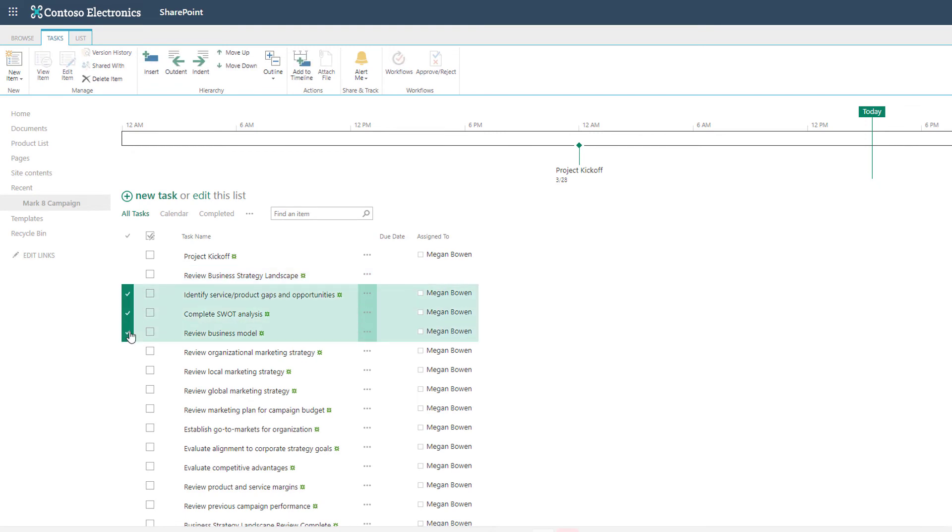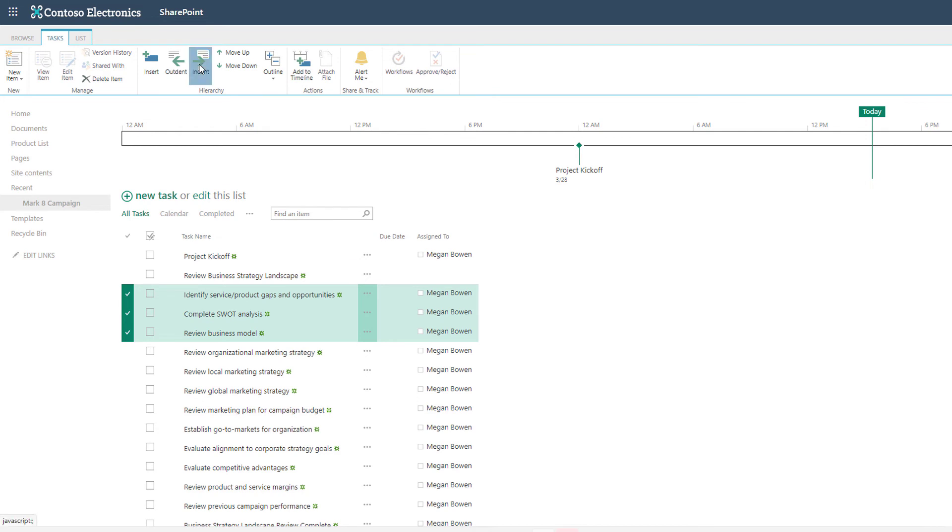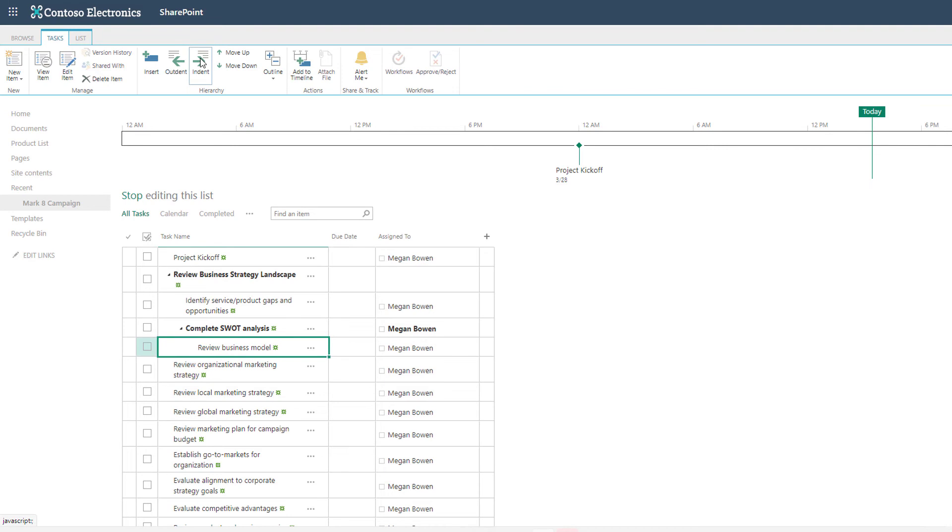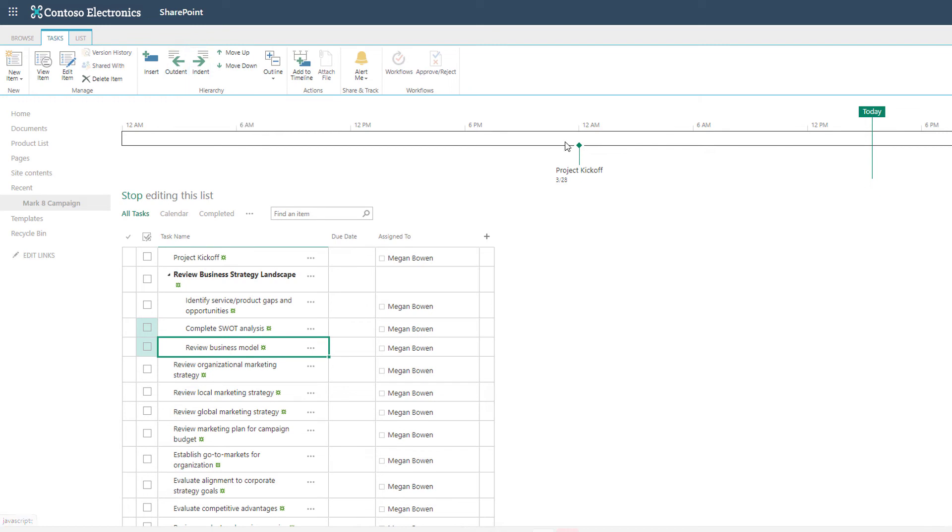Using the options in the hierarchy group of the task tab you can indent and outdent to create your subtask view if you need to. Let's use indent and now I have a summary task and subtasks. You can create multiple levels if needed. If you need to promote an item you can click the outdent option. And certain tasks can be added to the timeline so if they're milestones you might want to have them on the timeline like this one.